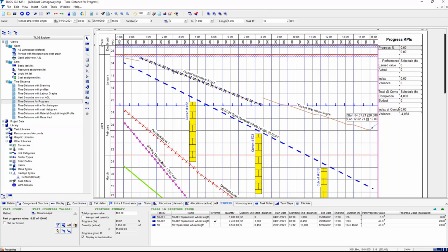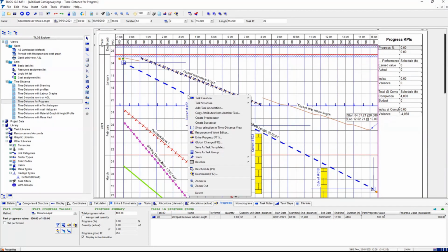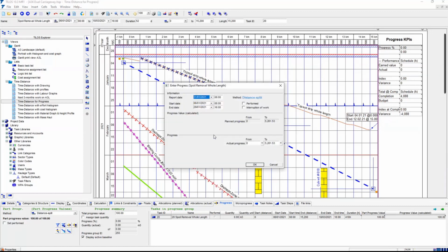I've got this bit of task that is an actual as built, and I've got a bit of the task sticking into the past. So it knows exactly where we were. We know exactly what we've worked to, and this is yet to be done. So let's just continue that theme. So the better news was that because we started later, we could get into that one. So I'm going to progress that as though we have done everything that we should. Well, maybe we're just slightly shy.